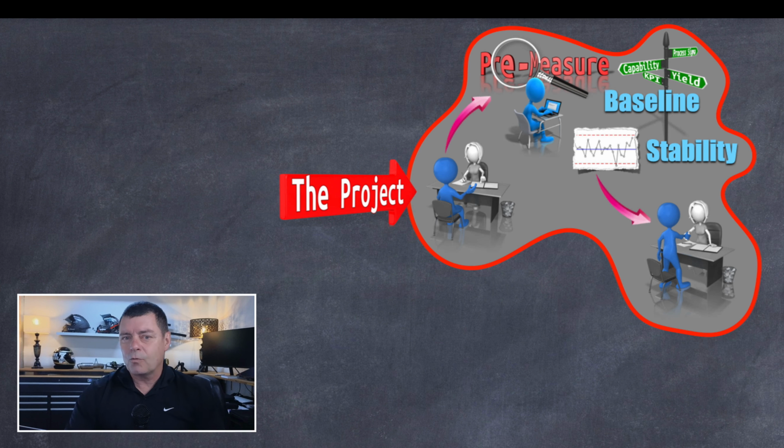Now, this is how we approach it, and we found this to be the most sustainable way to do it and the most effective way to get project work done quickly with the minimum amount of interruption to productivity. If you look at the screen there, this is the preparation phase of a project. In that preparation phase, I follow three fundamental steps. In step one, I would meet with the project sponsor, and that would be a line manager who has responsibility for the process that is being monitored. They're the person who's ultimately going to be the beneficiary of any improvement because it's one of their KPIs.